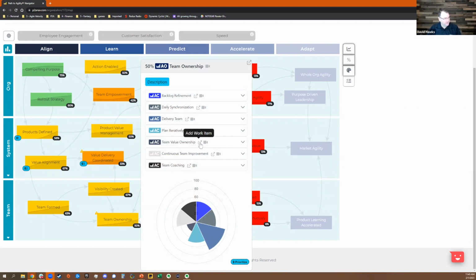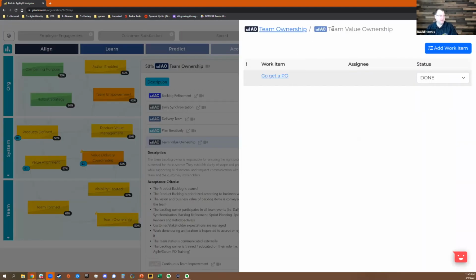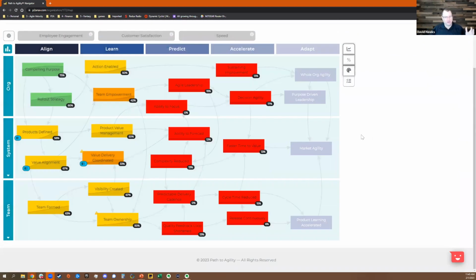I could then go in and update the assessment value of that item. And I could just do that every 2 weeks, right? Like if we say, hey, this is what we're trying to improve after this sprint, and we're working on that. And then as we finish that item, then we say, hey, was there anything that has changed? And we're just updating 1 or 2 items every 2 weeks is a healthier pace, and it keeps everything front and center from an improvement perspective and how we're tracking that. And that gives us more consistent data over time as opposed to the big batch process.